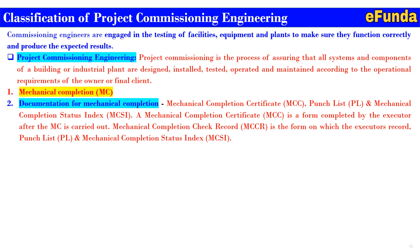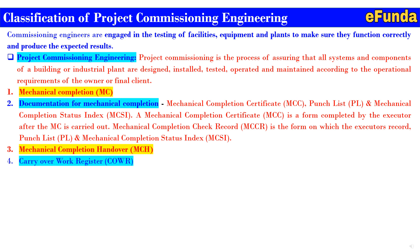A mechanical completion certificate (MCC) is a form completed by the executor after MC is carried out. The mechanical completion check record (MCCR) is the form on which the executor records the punch list and mechanical completion index status. Third, the mechanical completion handover is the activity of handing over from mechanical completion to commissioning at the commissioning package level, documented by the ready for commissioning certificate (RFCC). Fourth, the carry-over work register (COW) contains item numbers and cross-references to the punch list or MCCR, marked up on drawings or sketches and included in the record.